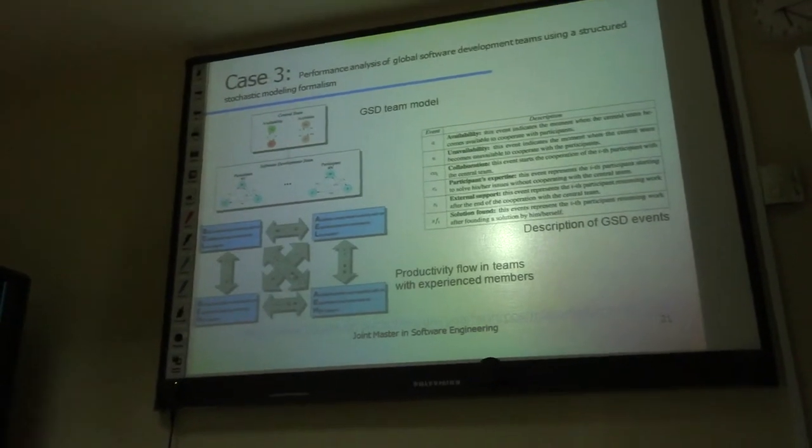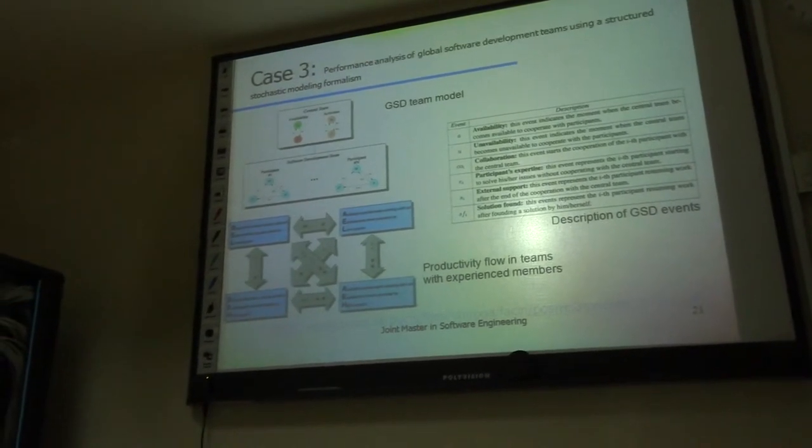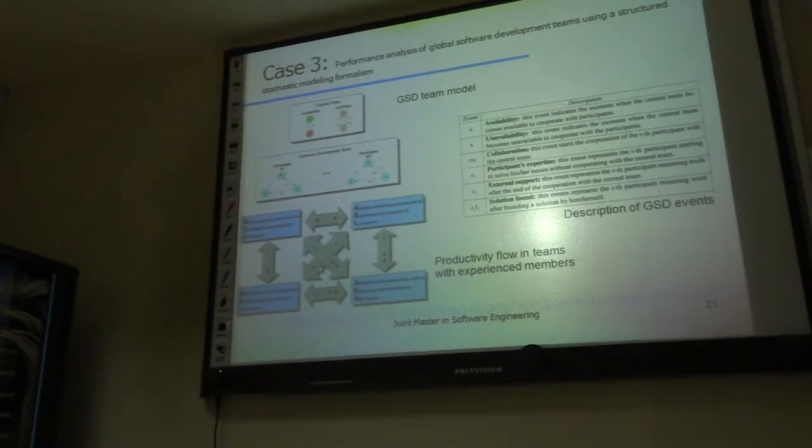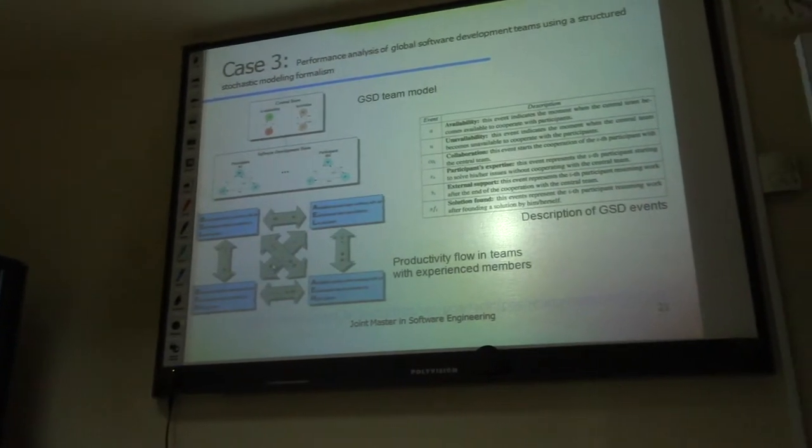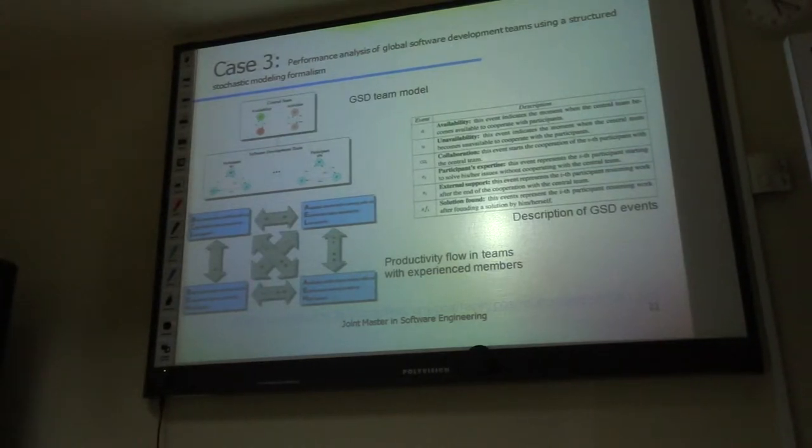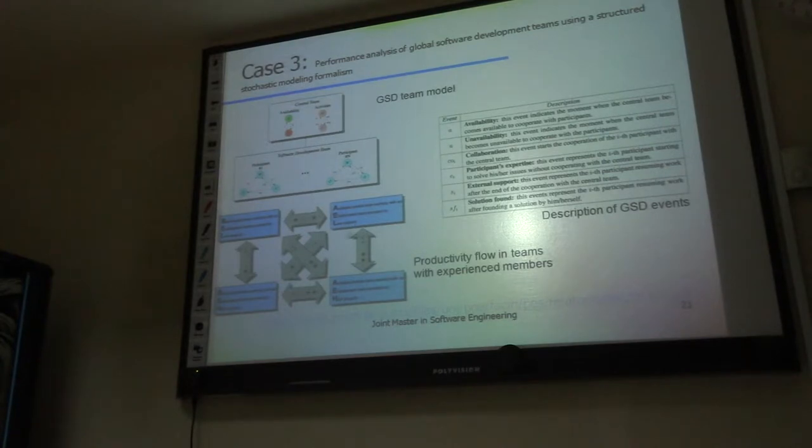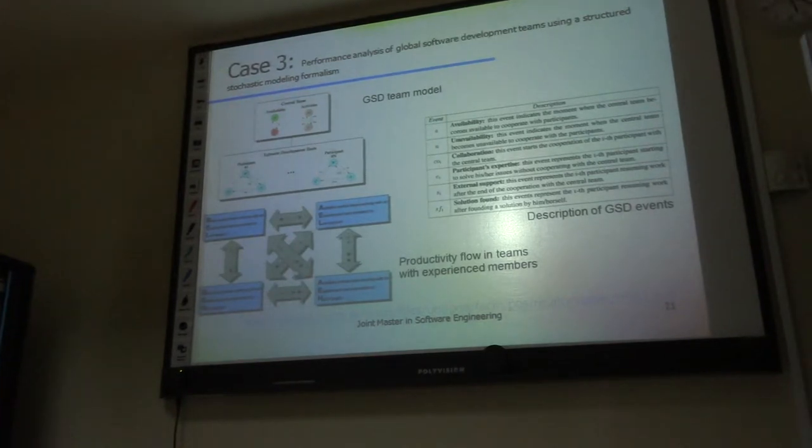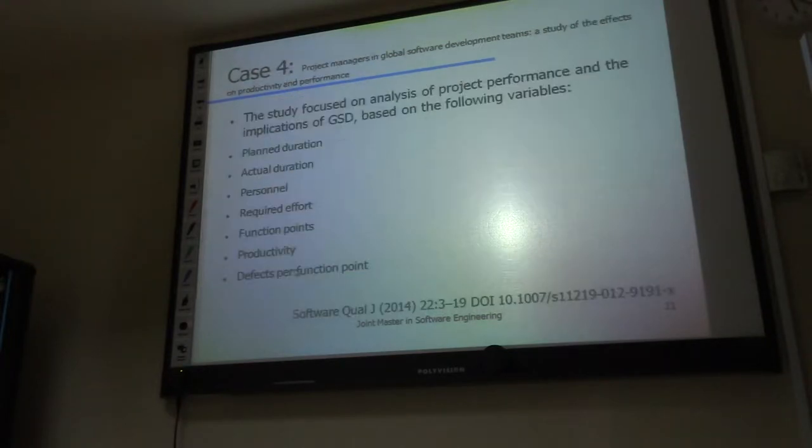What this paper is discussing about is that there is a productivity flow between teams of experienced and less experienced members. If you can see here, for example, we can have a busy central team working with an experienced team provided by low support. This is a very important model because it shows to you how virtual teams can be managed and what's the best way of managing the virtual team.